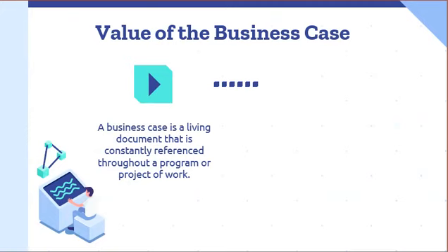project progresses over time. When a business case is inadequate or non-existent, the product scope may be unclear or poorly defined. This in turn often leads to scope creep, which results in rework, cost overruns, and project delays.